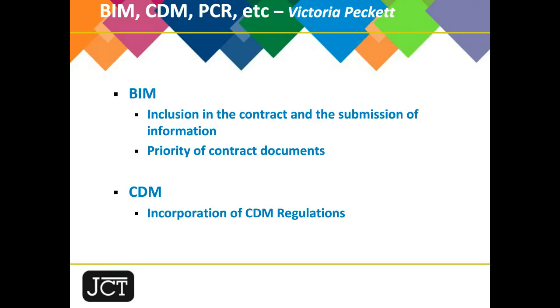So that's been adapted to reflect the fact that the parties might have agreed a design submission process under the BIM protocol, and that if that's the case, that will apply in place of the usual JCT design submission process. There are also changes made to the communications clauses within Clause 1 and elsewhere to recognise the fact that information may come in via the BIM protocol rather than other mechanisms.